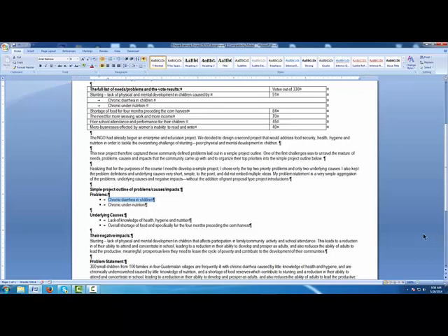complicating the learning process. Next, look through your vote results and your notes from the workshop and see if you can find underlying causes for the problems that you identified. Add 1 or at the most 2 underlying causes for each problem to the outline.